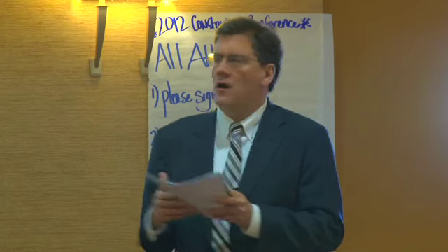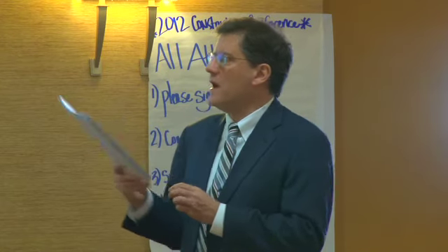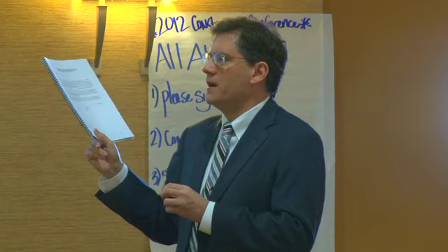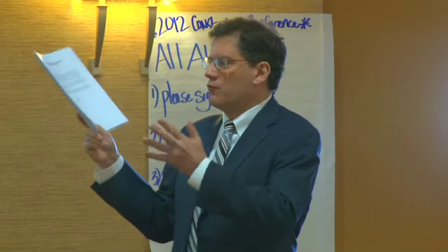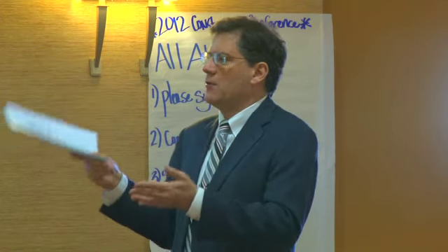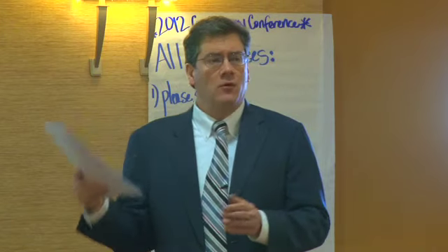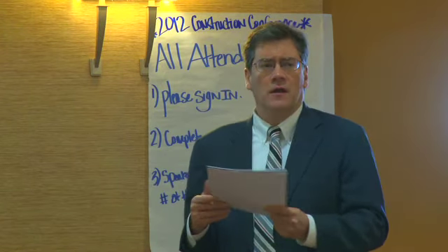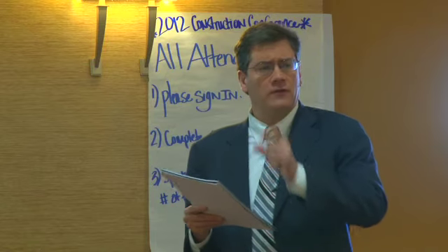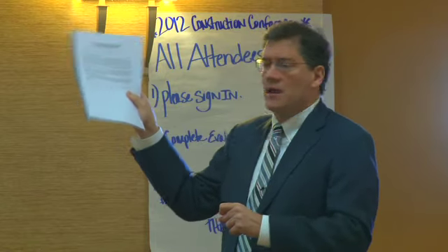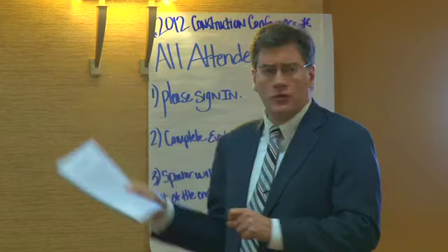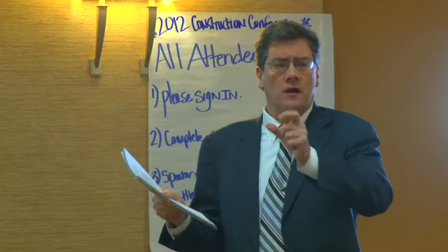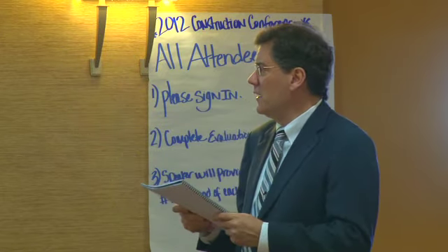All right, they are asking you to waive your rights to record a lien claim or make a bond claim through January 31st, but they're only going to pay you $30,000. Don't do it, because even though you weren't paid all $50,000, by saying you've been paid through January 31, you waive those $20,000 worth of lien and payment bond rights.